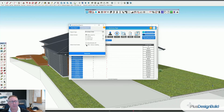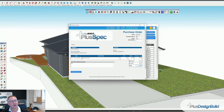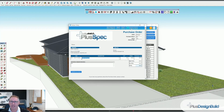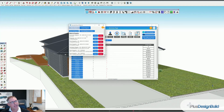If I click Watt's Carpentry, choose what I've created the purchase order for, and go Generate — because I've already generated this purchase order, it asks whether to update it, override it, or just open the saved existing. I'm going to go Open. If you've done this from scratch, you'll be creating your purchase orders as you go, and you should click Save Report once you're happy with what the subcontractor is going to do and the price you're going to pay. You can also send it to Xero. I actually save them myself — I've gone through all my subcontractors. At the top is the button Save Reports, with the ability to export all reports or send all reports to Xero.